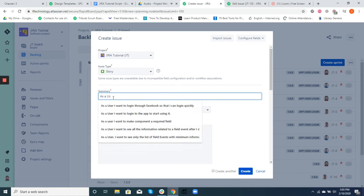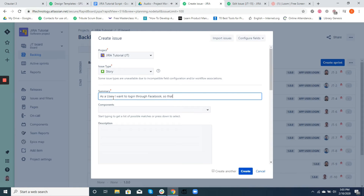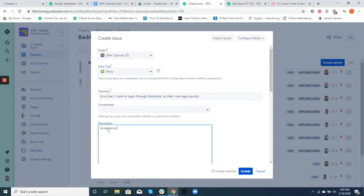Let's choose to create a story for this instance. Once that is done, you need to write down the summary for that issue. The basic structure is: 'As a user, I want to perform so that...' The reason we write in such a format is that the cross-functional team we work with will exactly know the who, what, and why elements of the task. The deep understanding of the task is written as an acceptance criteria, which is also the definition of done.